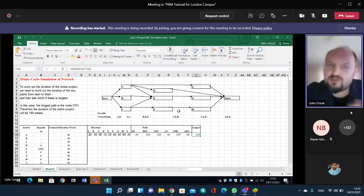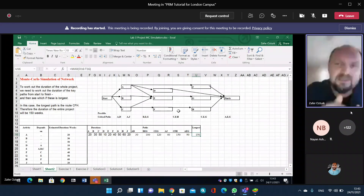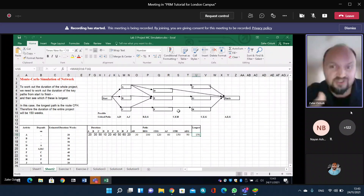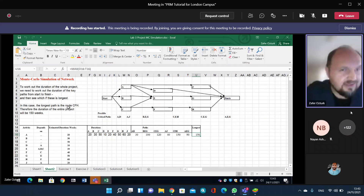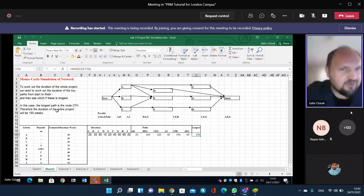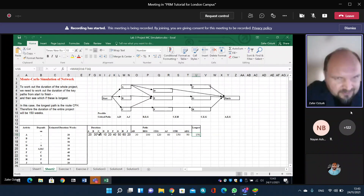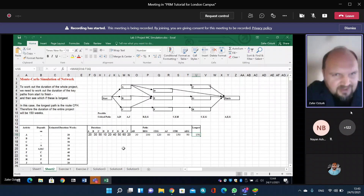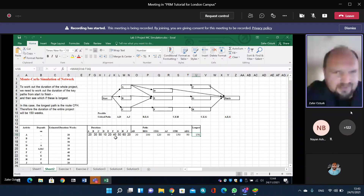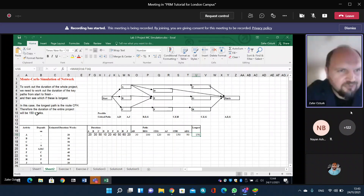Throughout the PMF lectures, we already mentioned that there could be more than one critical path, so we can apply some crashing activities. In this example, the critical paths have been identified already. The longest path is route C, F, H. Therefore, the duration of the entire project will be 150 weeks. C takes 50 days, plus F takes 40 days, plus H takes 60 days: 50 plus 40 is 90, plus 60 is 150 weeks.